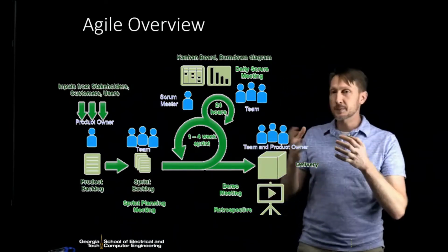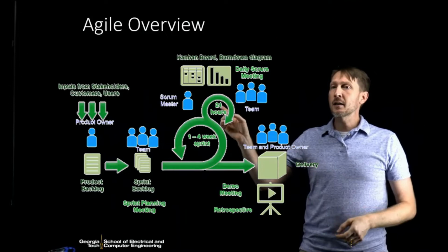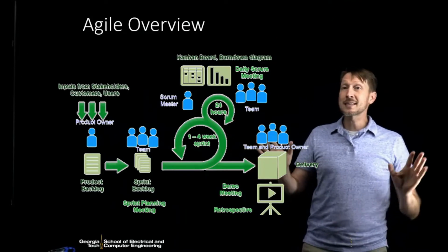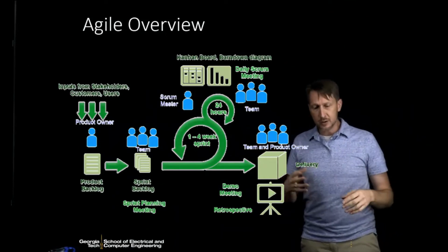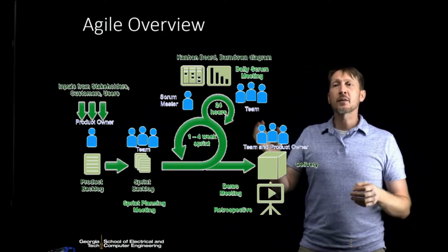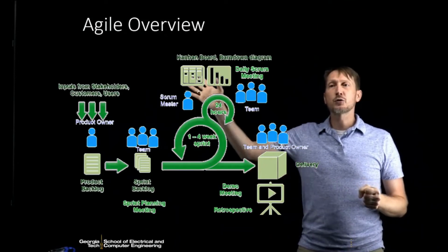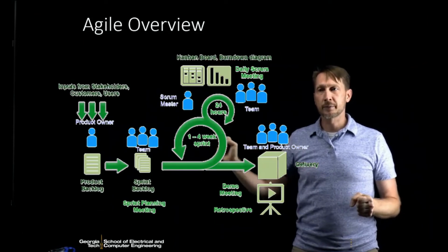We usually like to, especially in the class, lean more towards a 1-week sprint. And every day you'll go through a 15-minute stand-up meeting. If this were an actual company, you might do your stand-up meetings only maybe once or twice a week. But you get the team together and make sure you're on the same page. And then you track your progress as you go through the sprint.